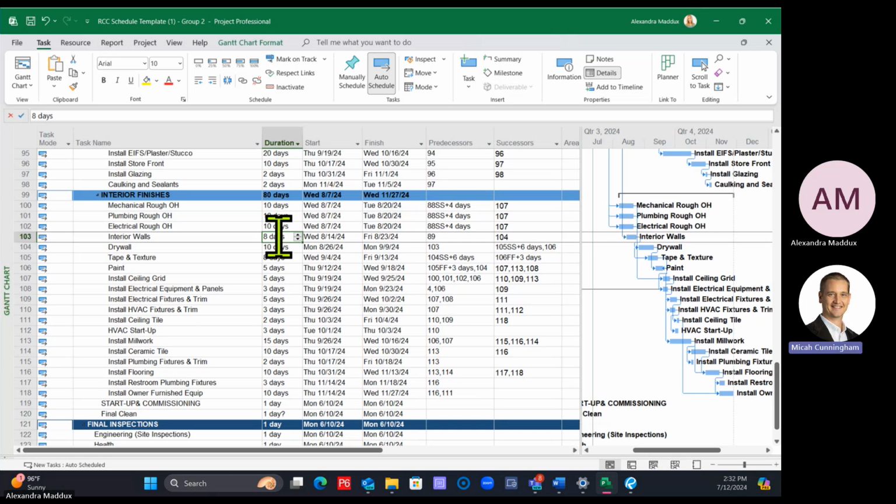I mean, you could, but I would hide that column unless it's important for someone to see. Usually for the subcontractors, it's just so you can filter for only their work and send them that. Okay, it's just so you find their stuff. Yeah, so you can check to see if you're trade stacking. It's more beneficial when you have multiple buildings or multiple floors, to make sure you don't have them on 2 floors at once.